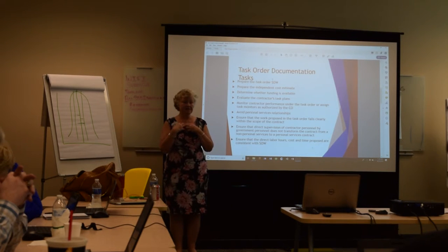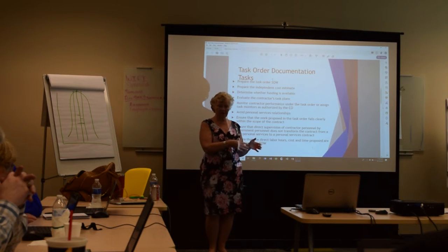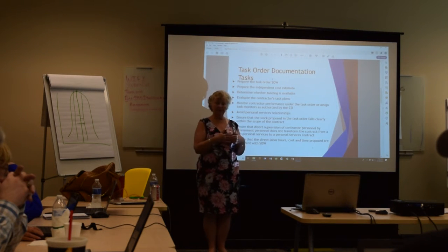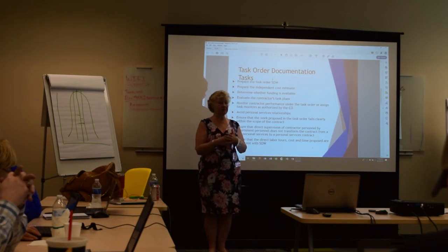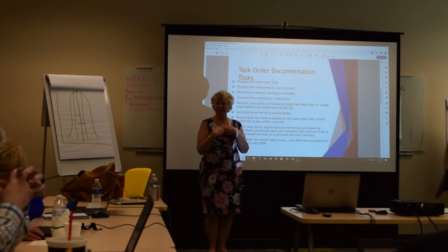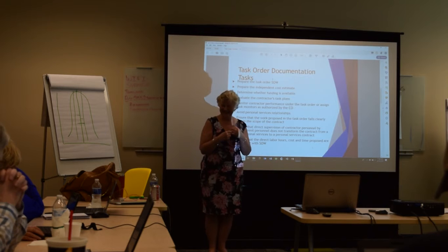What I have to do instead is go to company XYZ, who Don works for, contact the contracting officer and say, I have a problem with the way Don's performing the work. They need to talk to Don and get it straightened out. Or maybe Don doesn't have the expertise, maybe they bring in somebody else to replace Don, but it's their issue to solve, right? Not me. I don't have the expertise.